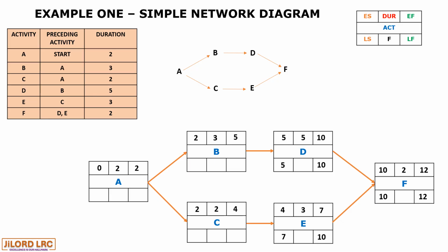So the latest start of activity D and E will be the late finish of activity B and C respectively.